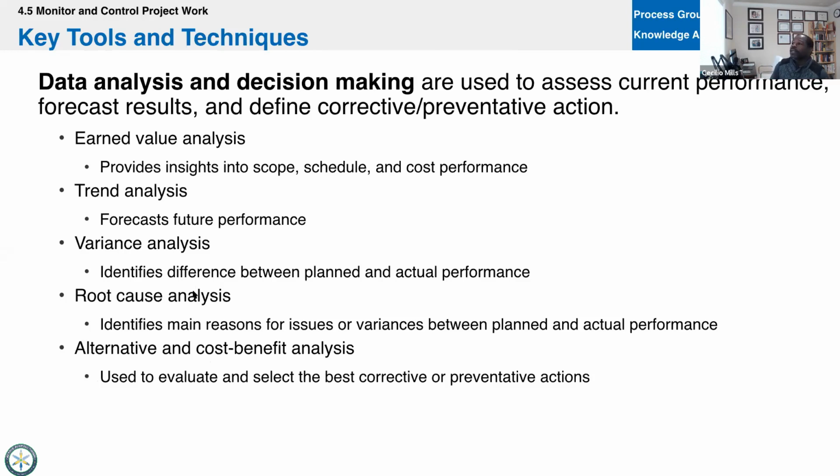Here's an example. You're a project manager for XYZ company, and your project is to build condos off the coast of Florida. You have noted in your risk management plan how to handle weather-related type of risk. And you qualify that the hurricane was likely to happen and it was going to be extremely impactful. And you quantify the fact it was going to cost the company $4 million. Your risk response was to board up the windows and place sandbags and send all of the workers home.